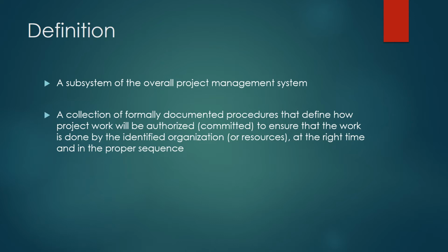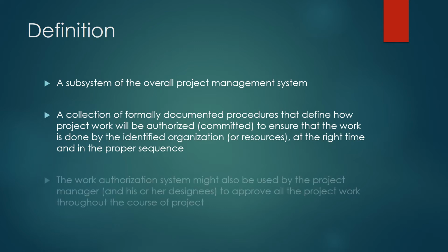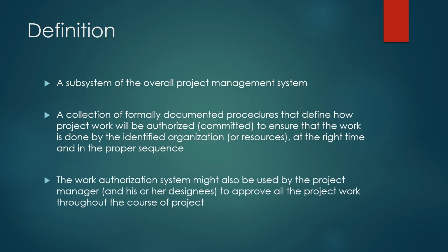So, right out of the gate, work authorization system is something which is extremely important, you might think, right? Without a work authorization system, you cannot expect projects to run. Now, the work authorization system might also be used by the project manager and or his or her designees to approve all the project work throughout the course of the project. So, not just assign the project work, right? To approve the completed project work, a work authorization system might also be used.